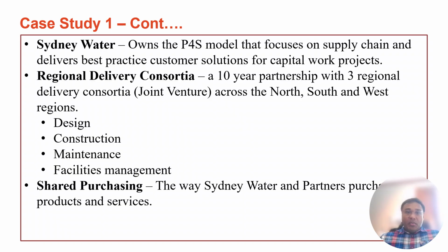So what is the benefit of using an NEC contract, in this case Sydney Water? NEC4 contracts are global best practice for construction and infrastructure procurement, so it's already a proven method. They bring a collaborative way of working upfront with the supply chain companies, and a simple contract structure reduces disputes between parties. So that's pretty much how you look at this contract and how Sydney Water has implemented it.